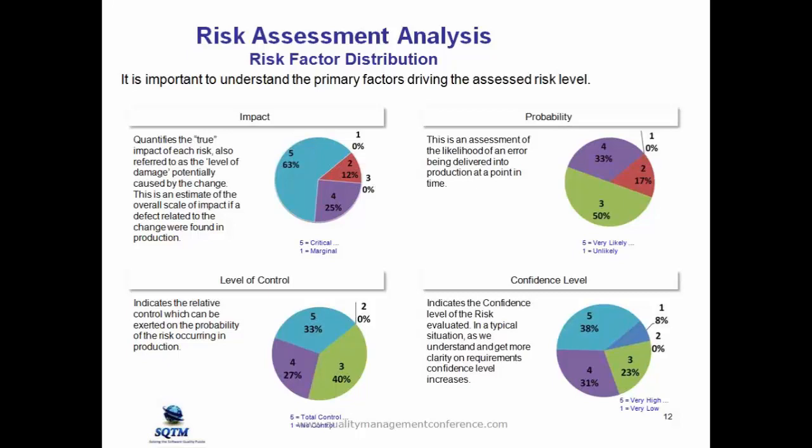Each requirement will have its own risk factor, and it will total up the overall risk rating for that particular application. You would do this at the end of analyze, at the end of design, and you could also do this at the end of build. The reason why we're doing it more than once is because risk changes.